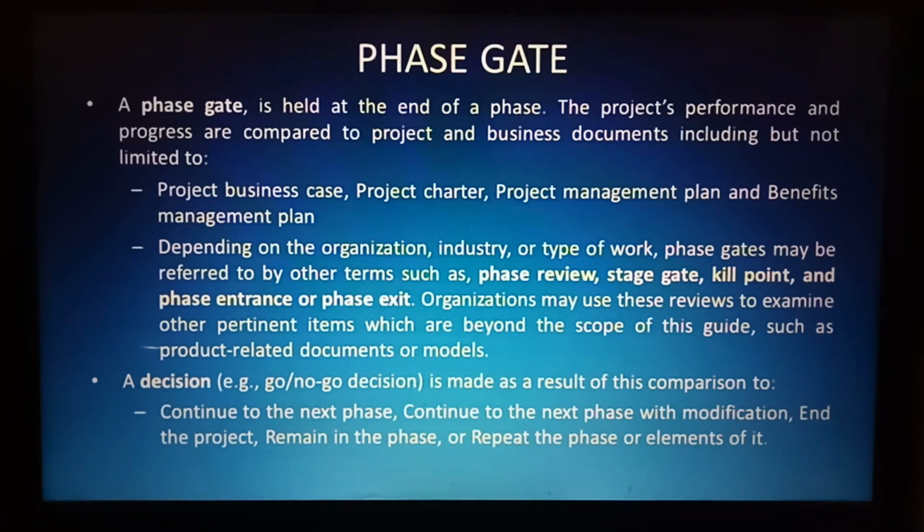What is a phase gate? A phase gate is held at the end of a phase. The project's performance and progress are compared to project and business documents, including but not limited to project business case, project charter, project management plan, and benefits management plan.